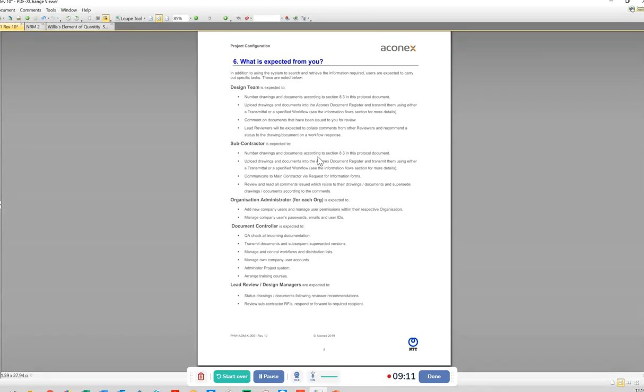because like we may know or not, the client's job is to approve documents coming through. They also answer queries that are requested of them, and so it's important to know what is expected of you and then what you're supposed to be doing using this system. You would usually not have the client raising requests for information because they are the client or their consulting team, but you would have the subcontractors or main contractor raising lots of RFIs. RFIs there, I mean request for information. That's the acronym, request for information, and so